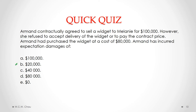The answer here is B, $20,000. We get to $20,000 by calculating expectation damages as equal to the expected benefit minus expected costs. The expected benefit Armand expected to receive if the contract had been performed would have been $100,000 — the amount he would have received from Melanie. His expected costs are $80,000, the cost of the widget. So it's $100,000 minus $80,000, which gives us $20,000.